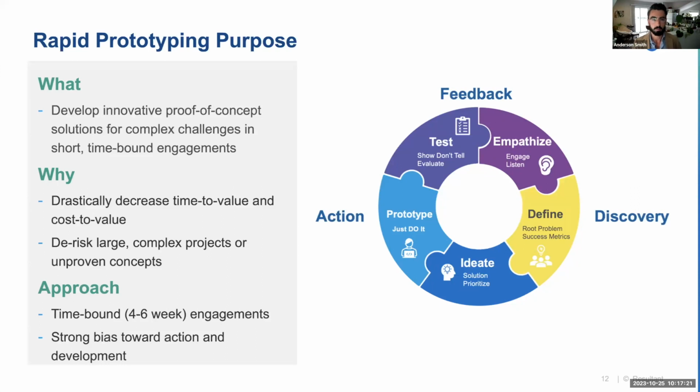It's really important to know that rapid prototyping projects are not meant to be production-ready solutions. As I referenced earlier, if you are ready to build out a production-ready project, if you already have everything defined for that project, you have all of your requirements, you know the tech stack, you absolutely know that it truly does meet the needs of the end users, then that may not be a good candidate for a rapid prototyping project. And it's important with rapid prototyping projects, around that time-bound component, to really make that clear with whoever the stakeholders are for that project, whether it be a client of yours, your leadership team, or your own team who will be utilizing that end solution: let them know that it's time-bound and that it won't be a production-ready solution.